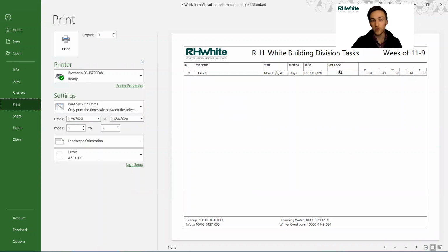And the cost code is here, so there's no confusion as to what the time should be coded as. So it's clear to the crew what the expectation is for them to be working on. And if we had a few more tasks here, like we normally would, it's a nice indication of what people should be working on each day and the expectation of how much labor they should be putting into each task. So you can print this out separately for the crew that was working for us, and this also formats differently, so anything you change on this schedule, as you can notice, it's a little bit different than the format on the previous thing. This prints out separately.